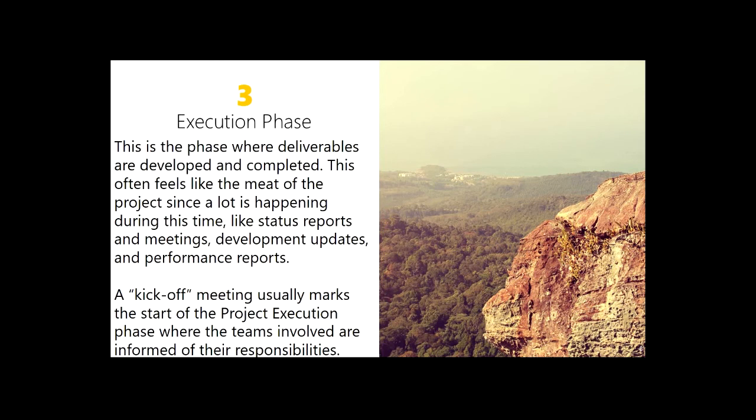The third phase is the execution phase. This is where everything starts. This is where the entire thing begins, and it usually has a kickoff meeting. This marks the start of the project execution phase. So you might think that the kickoff meeting is in the initiation phase or the planning phase, but it's not. It's actually in the execution phase. It's kicking off the entire project.